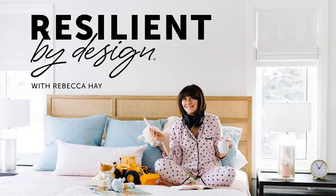So having the implementation process as a separate phase means that when we're in it, we can just focus on making decisions about installation, helping the contractor, helping the trades, helping your builder. So that would be the second thing, is having a very detailed, clear process. Right on the coattails of that is number 3 that has helped improve our experience with project management, is having a full design package before we start construction. Let me repeat myself for the cheap seats in the back. Have a full, complete, detailed design package before you take a sledgehammer and start construction.